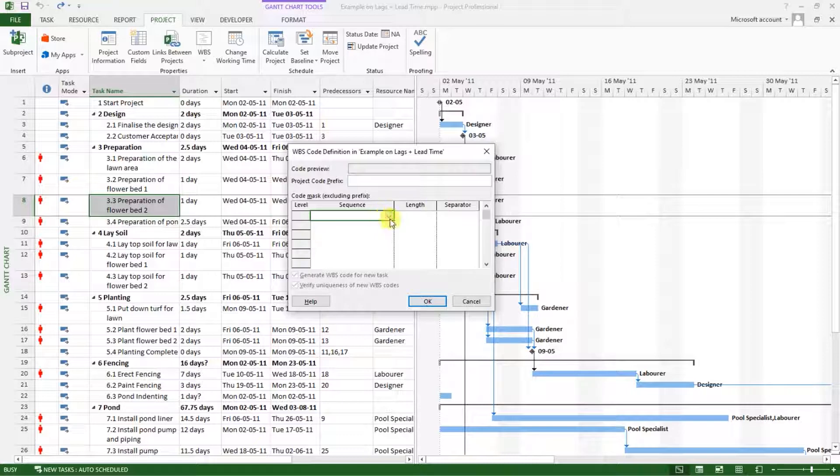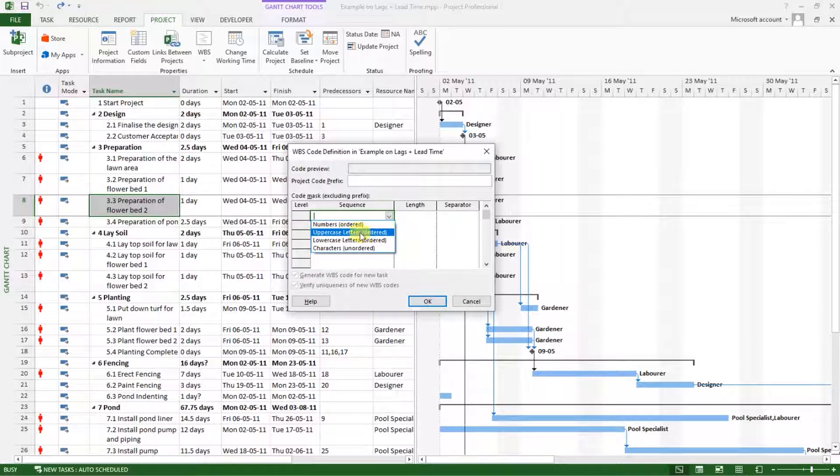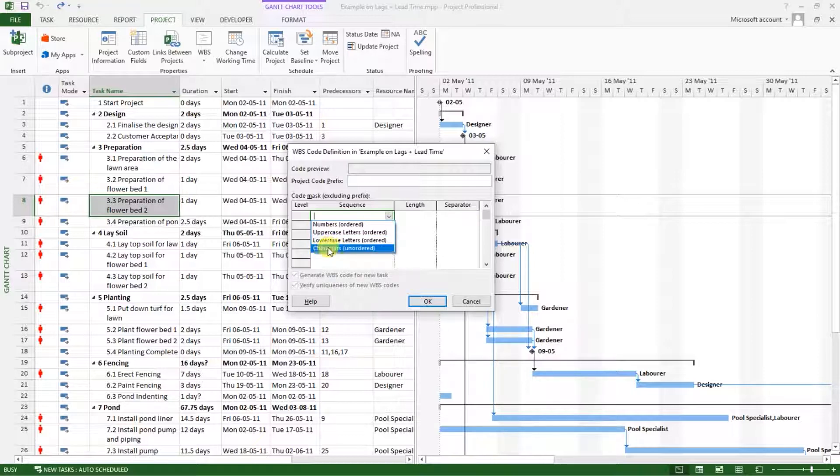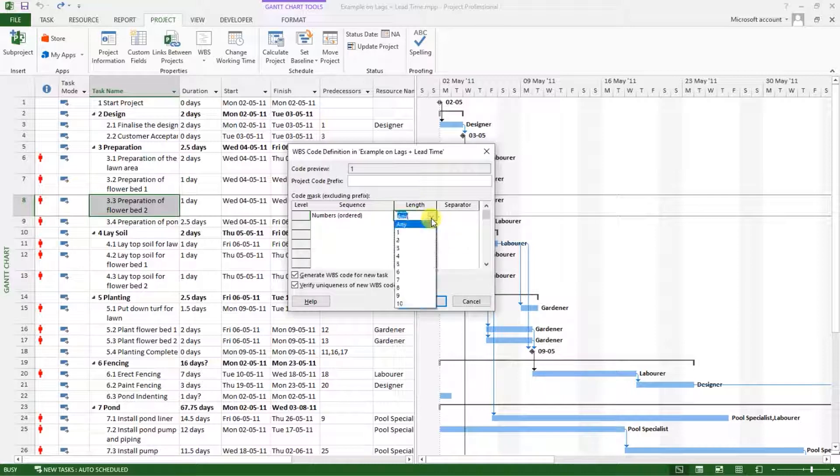When I click on this dropdown, you will see four options: numbers ordered, which is the first one, we have uppercase letters, lowercase letters, and characters. I will choose numbers for my sequence, and under length, I want to only have two. I only want to have two digits for this.